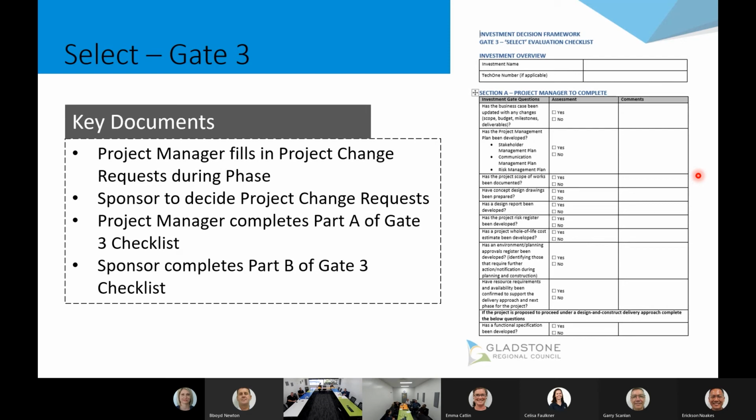So very much if we were still considering, when we're developing the concept, whether we're going to build a treatment plant or a reservoir, then we're too far. We should never have gone past gate 2. Does that make sense? Yes, it does.